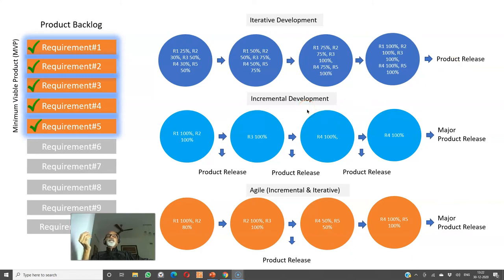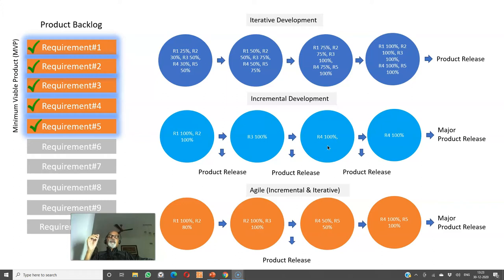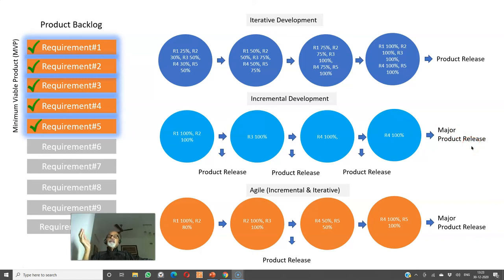Then we have incremental development. In the first iteration I take up requirements one and two, and my target is to complete them 100 percent. I make an interim product release to the customer comprising 100 percent of requirements one and two. Then in iteration two, requirement three is 100 percent completed and we make a product release comprising requirements one, two, and three at 100 percent. Then requirement four is completed 100 percent in iteration three, and we make a product release comprising requirements one, two, three, and four. In the final iteration, requirement five is completed 100 percent, and we make a major product release at the end of the fifth iteration. At the end of every iteration, you make an interim product release.